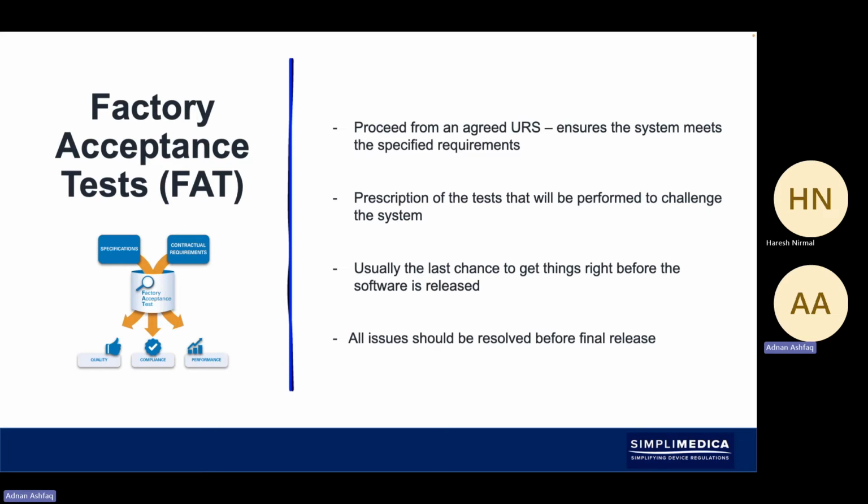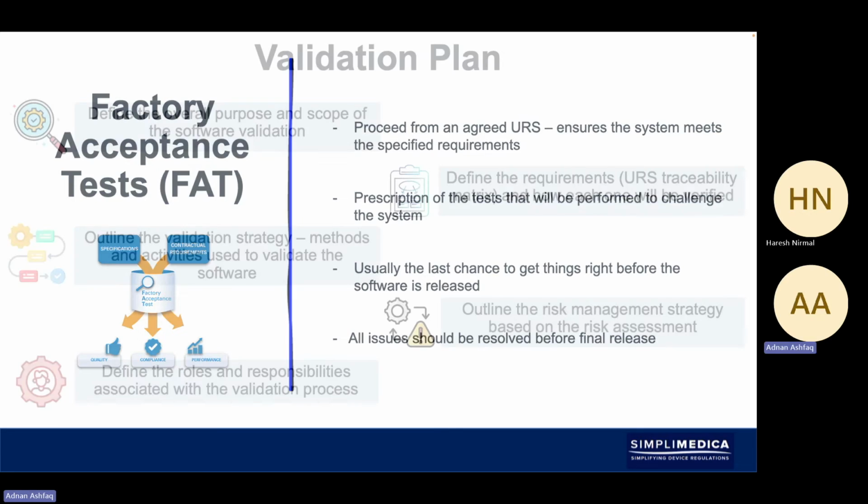The thing is that you do a factory acceptance test normally before the equipment is being released for use, or the software is being released, and then that's your last chance to make sure that what you're receiving is as you expected it to be, and any issues should also be resolved before final release.